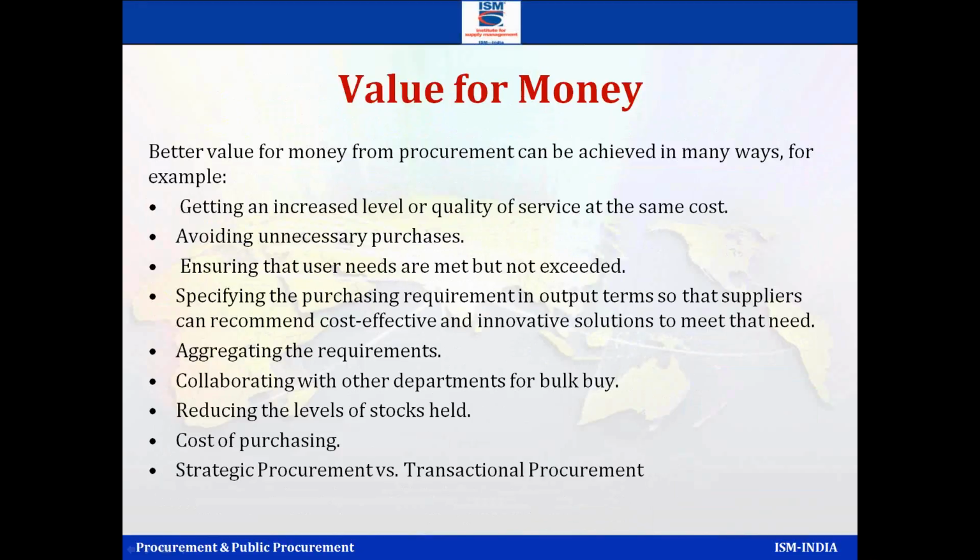But the key issue comes when auditors come and check you. They say, guys, okay, you're paying more price by saying it's a value for money. Some people may like to hide under the name of value for money. They say, guys, have you explained in your bidding documents? Your bidding document should qualify what value stands for. Who will get extra weightage if this is so and so. So that has to be defined. Otherwise, it becomes very personal, very subjective. Oh, I feel it's a value for money, but my friend feels, oh no, it's not a value for money. And then under the name of value for money, I might be spending more money.